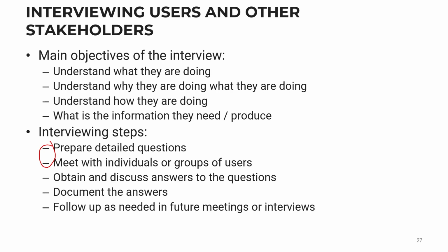But sometimes when the project is large, like the project that we did with Mahidol Hospital, they wanted us to interview the entire hospital. I mean all departments, and that was 43 departments in total, and it took us almost a year to discuss with every one of them. But before we meet the staff in each department, we need to know what we want first.